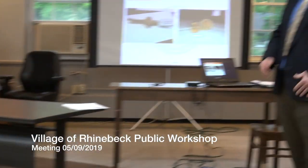So there's possibility that the curb valve could be galvanized. Could be a midstream connection. They may have only replaced it at the time to where they had to. And so they may not have gone all the way to the property boundary, depending on what the problem was at the time. So there's also potential for there to be a galvanized line in the basement, and it's already coppered out at the street, in which case, at the time of installation, we'll just make the connection. We will direct them to do that. Okay. And deal with a change order.